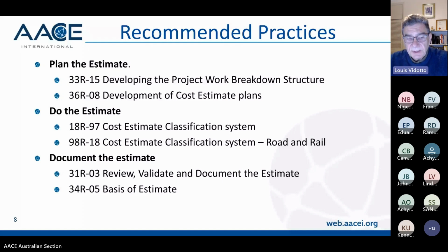Document the estimate. So again, they've got recommended practices on how to review, validate, and document the estimate. And I'll talk a bit more about the importance of doing that later on. And also they talk about the basis of estimate, where you document the assumptions that you've made, the labour rates you've assumed, the contracting plan you've assumed, what the quantities look like, what the schedule looks like, your production rates for the various commodities. So again, AACE have a fantastic library of recommended practices. So if you're not sure about something, talk to the experts, which are the AACE recommended practices.